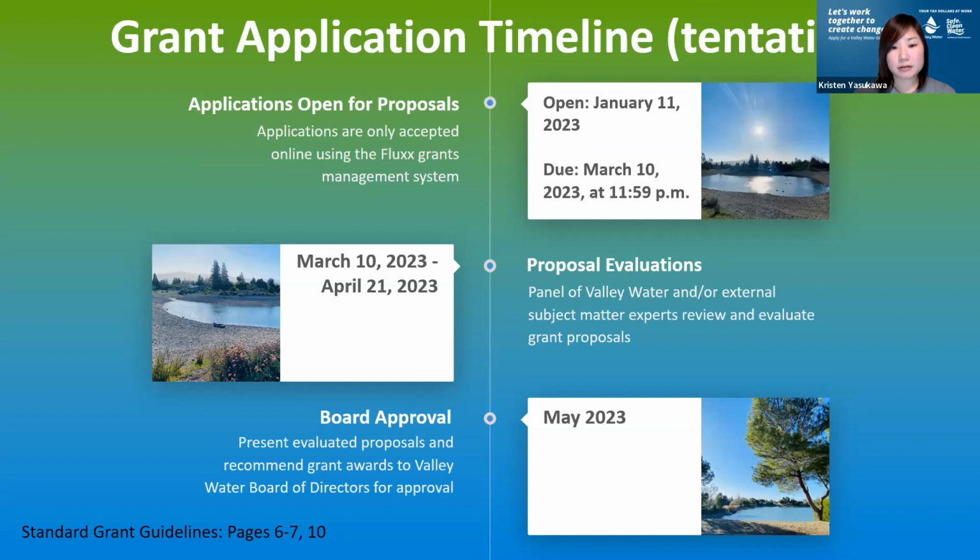So we will pay out the direct costs, and we'll go over the other aspects of the budget later in the presentation. If you do want to build in that inflation as part of your budget, what I would recommend is to indicate what the actual cost is now, and then you can always submit a supplemental narrative that goes along with your budget.